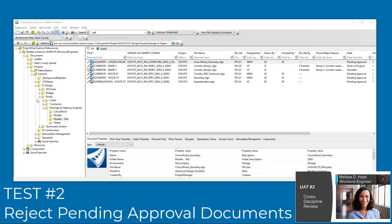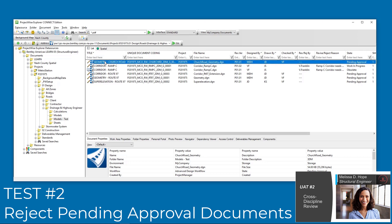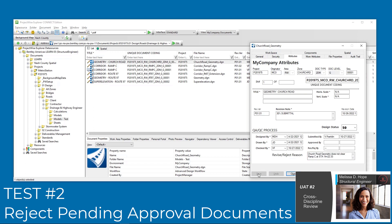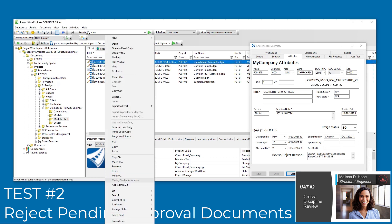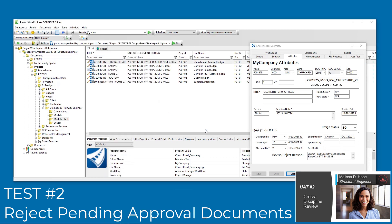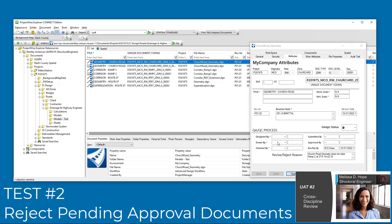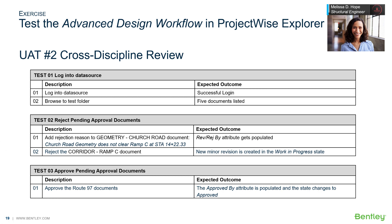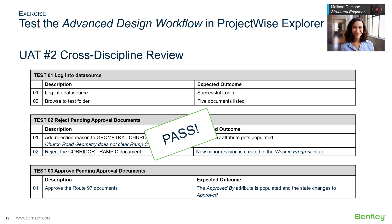Test 2. When Melissa checked the Church Road Geometry model, she found that the Church Road Geometry does not clear Ramp C due to a bent in her OpenBridge model. Back in ProjectWise Explorer, she enters a reject reason and saves the document attributes. She then rejects the document from the change state menu. A new version is created and given a new minor revision number. Test 2 passes.